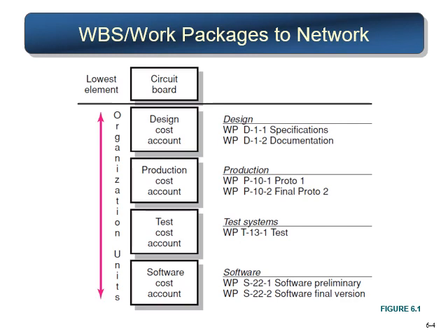WBS, work packages to network. We have done this WBS before, work breakdown structure, where we break the project into smaller activities or packages. Again, the WBS takes place in different levels. In level 0, we have the whole project. Then if you go to level 1, we break down the project maybe into 4 different packages.